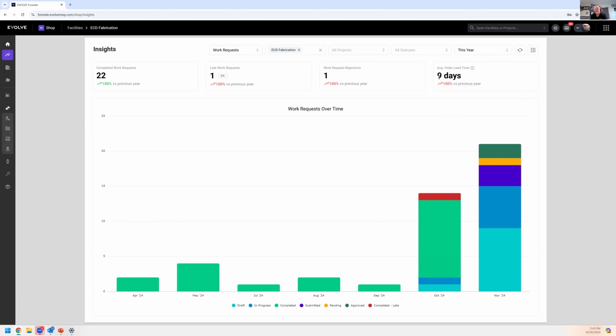They can see this in real time themselves. We don't need to tell them when they order it. They can see that our lead times are currently at 9 days, which is nice because some of us get very busy sometimes. Sometimes our shops slow down. Well, 3 months ago, you could get something in 6 days, but now we're super busy and it's going to take 9 days to get it to you. It's just a fluctuation based on workload in our facility. So that's one of the lead times there around orders for fabrication.